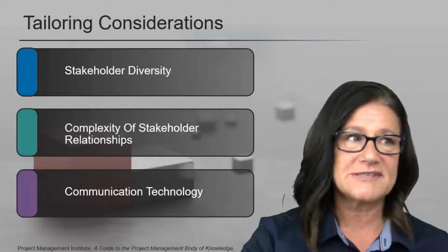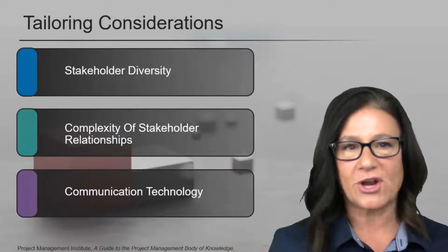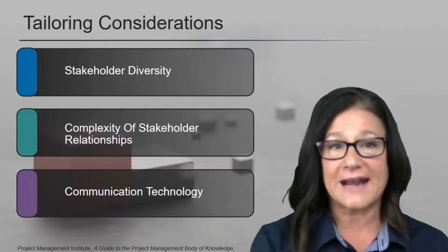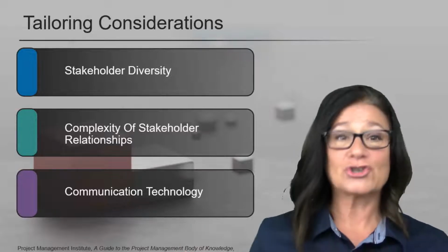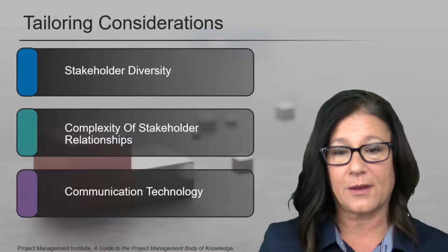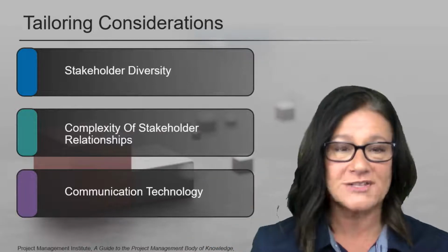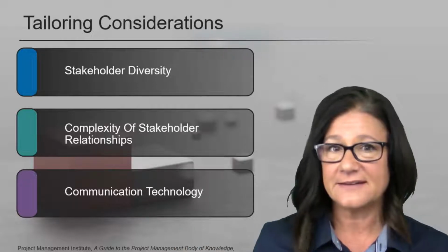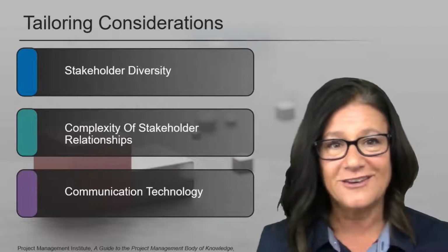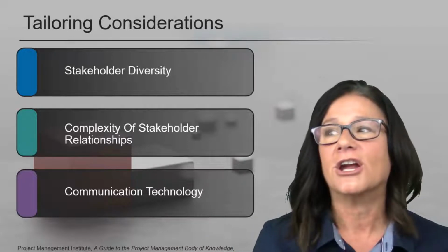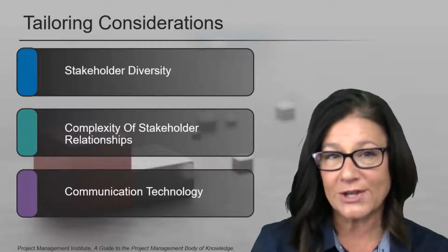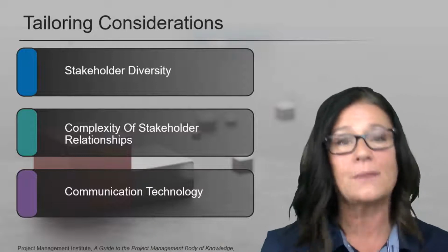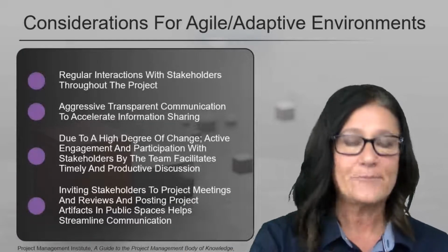But at the same time, PMI would say, okay, let's pretend this is a brand new project. You've never worked with these people before. You have no idea who they are. So now you've got to go forth, figure that out, Sherlock it, determine how to interact with them, how to communicate with them, what their level of power over the project work is, and what their level of interest in the day-to-day is. If you've ever been invited to meetings you had no business being in, that's what I'm talking about. You're like, why am I here? Complexity of stakeholder relationships, interrelationships, that could be hierarchical, political, how you're going to communicate with them, how often, what time zones, that kind of thing.